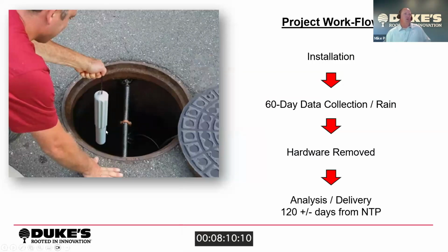So the project workflow, it's quick. So we install the hardware. There's a 60-day data collection period. For people in more arid climates, certainly more attention has to be given towards when the rain is likely to occur, what time of the year. And we've set up plenty of these in 90 and 120 days and have some contingencies built in for the case of when it does not rain.